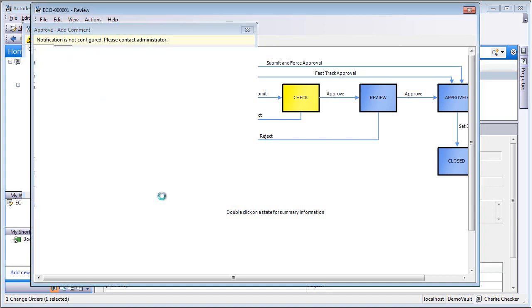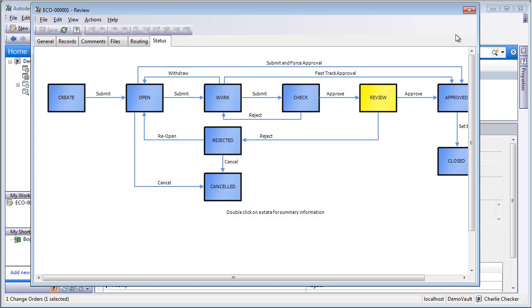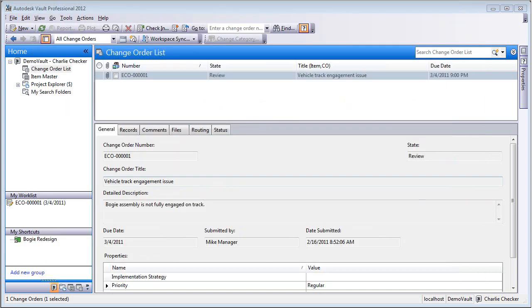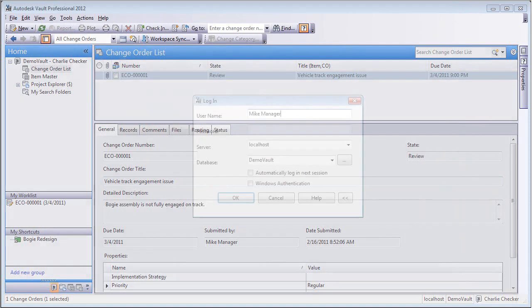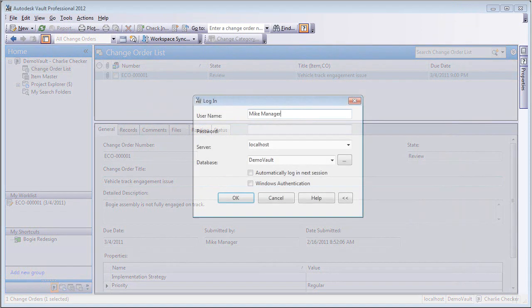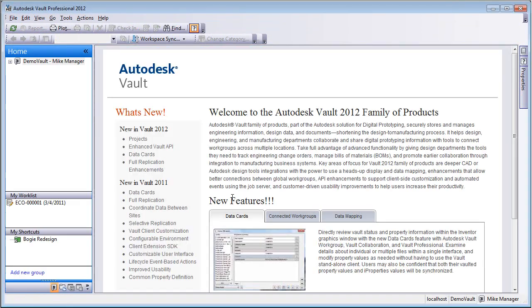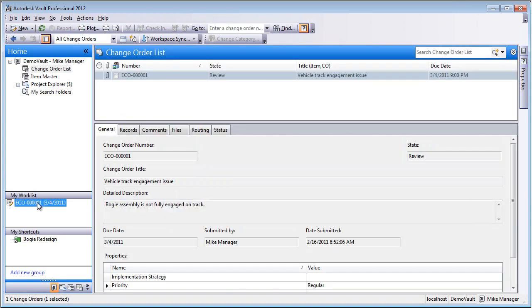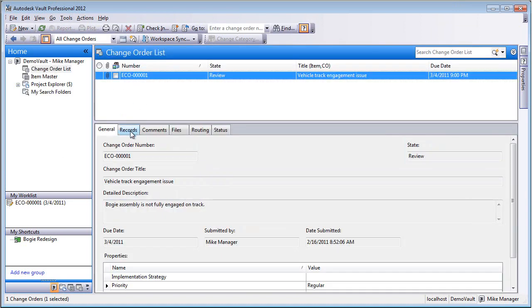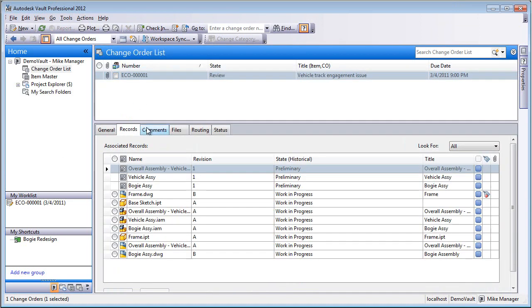So now it's up for review. And this is the person that comes in and reviews it can actually reject it and send it all the way back, or they can approve it to the next stage. So the approver in this case is Mike Manager.